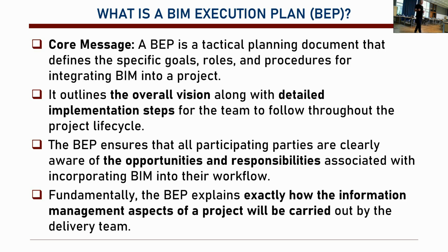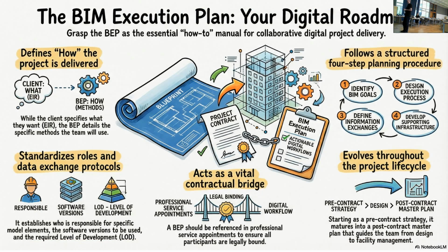Basically, the BEP, BIM Execution Plan, explains how the information management aspects of the project will be carried out, okay? So how are we going to manage the information throughout the project? That's the idea. The client comes with employer's information requirements, EIR, right? And the BEP details what kind of methods we will be using to provide that.